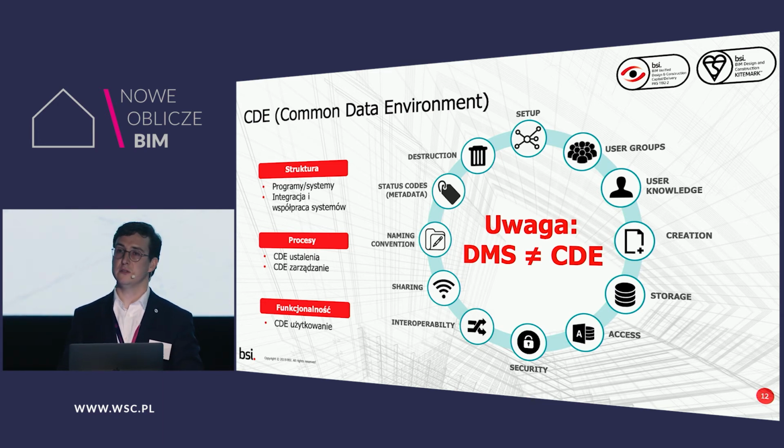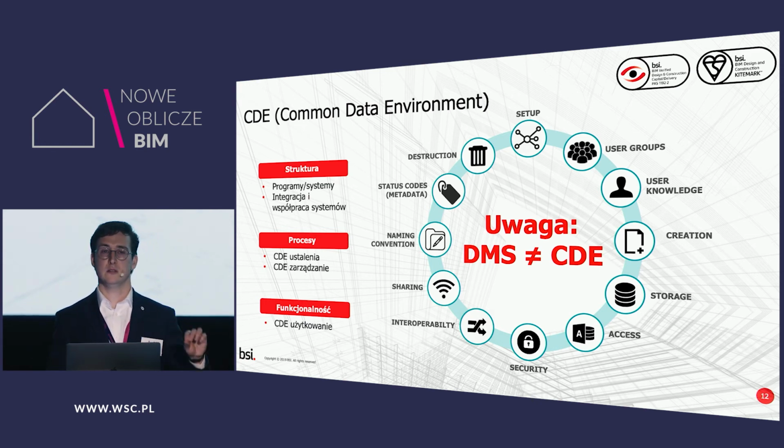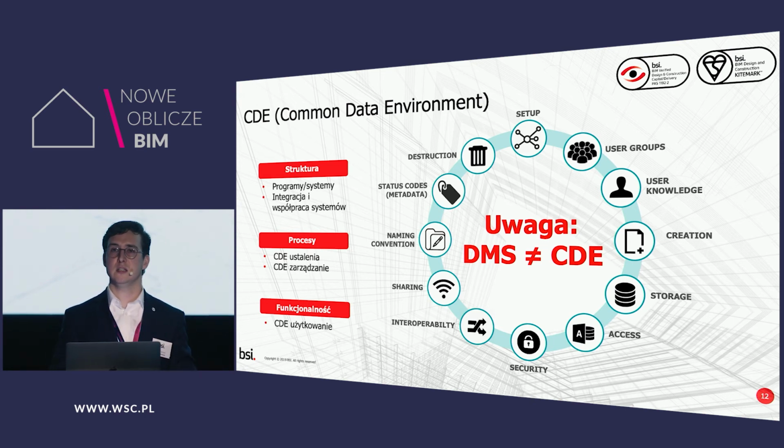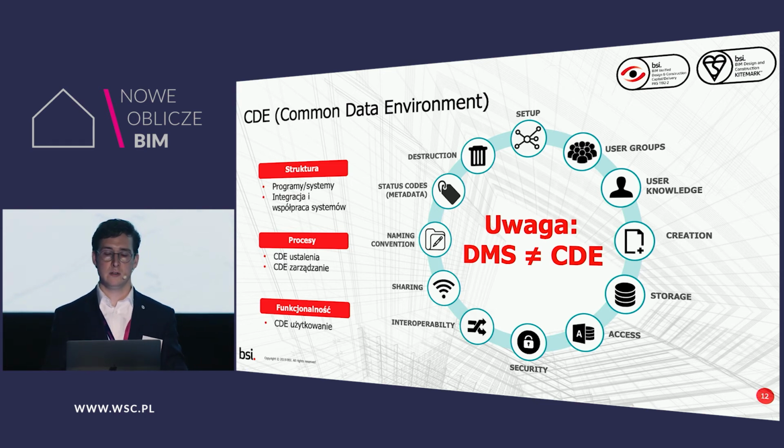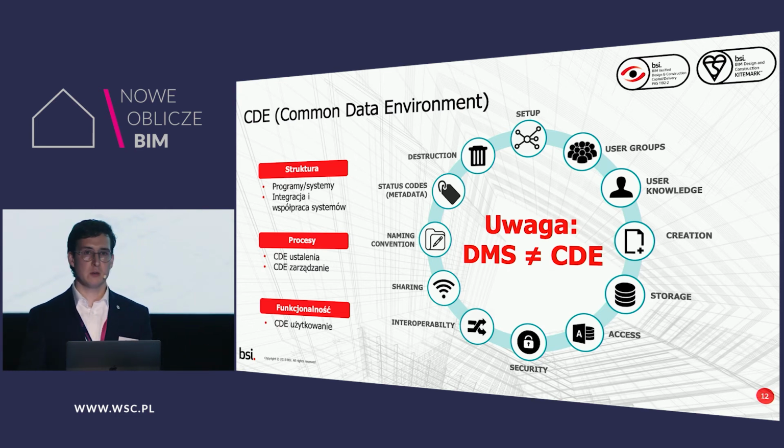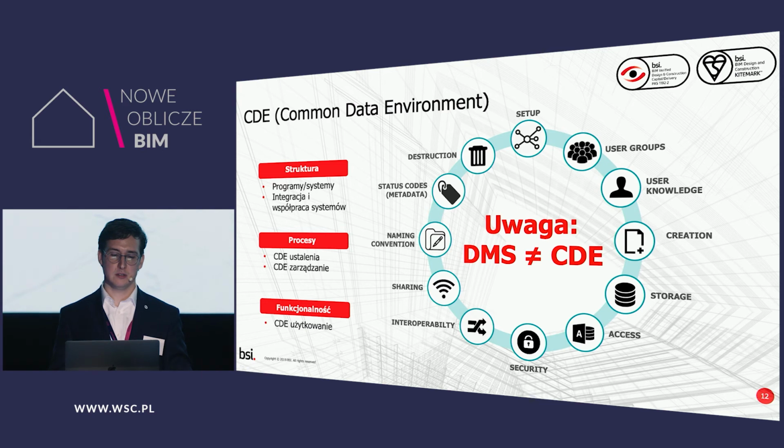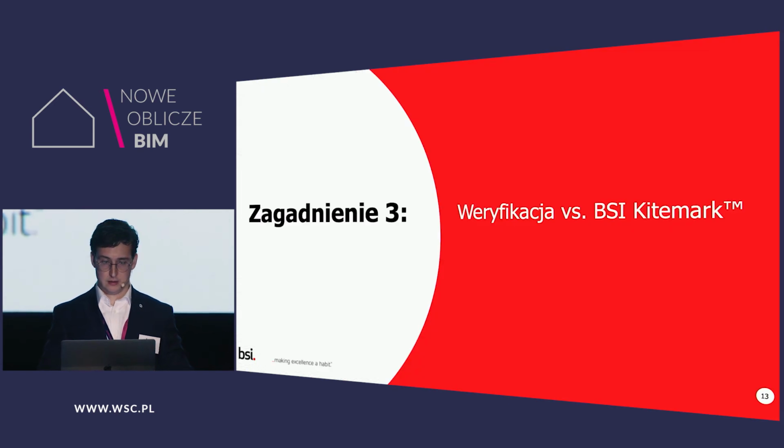We examine the systems being used to see whether it is in line with the ISO 19650. We have the work in progress zone, we have the shared, we have the published zone, and specific processes are described for each of these elements. That's what we audit. The document management system is not the same as common data environment because CDE is closely tied to the zones that I have mentioned, those areas of interest.